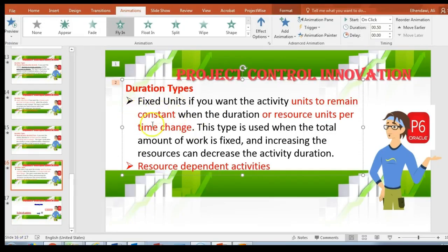The fourth type is Fixed Units: if you want the activity units to remain constant when the duration or resource units per time change, use this one — it's a resource-dependent activity. In practice I use the default, which is the first one — Fixed Duration & Units — because I'm primarily concerned about activity duration.